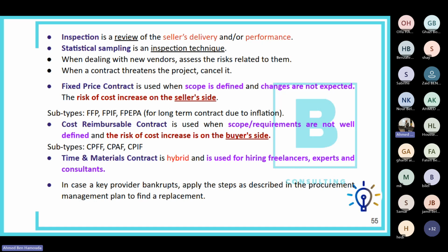If yes, that's fine. If not, if the performance is poor or they're not delivering what has been agreed, then of course for PMI, the preferred way is to talk to the vendor directly, or sit with them, find the root cause, but definitely go for an open discussion, face to face, with a confronting or collaborating mindset. Okay, don't withdraw from the contract. We will see here when to withdraw from the contract. Let's see it, because in this version 2 of the tips and tricks we've added several tips and tricks for the procurement in particular.